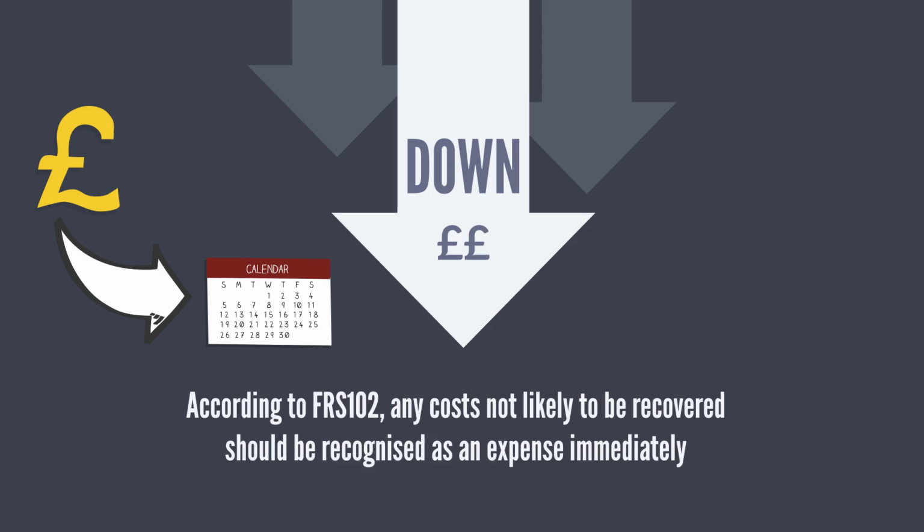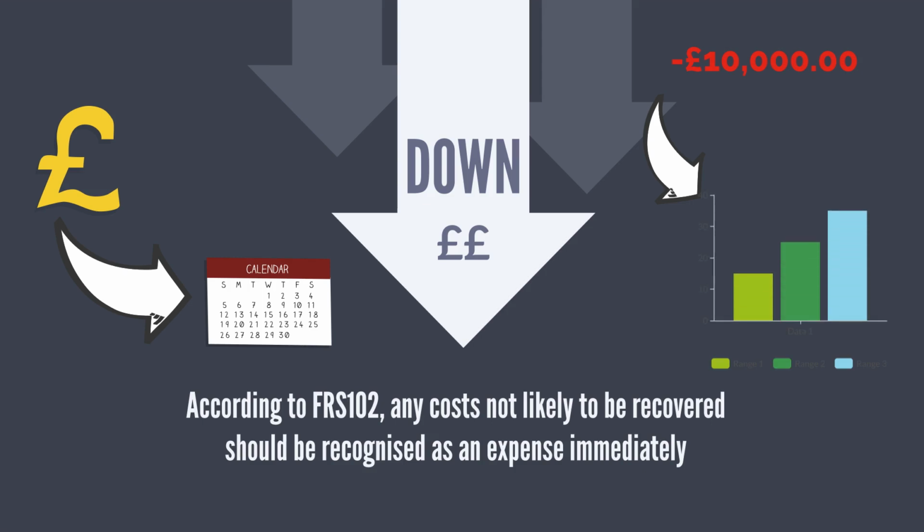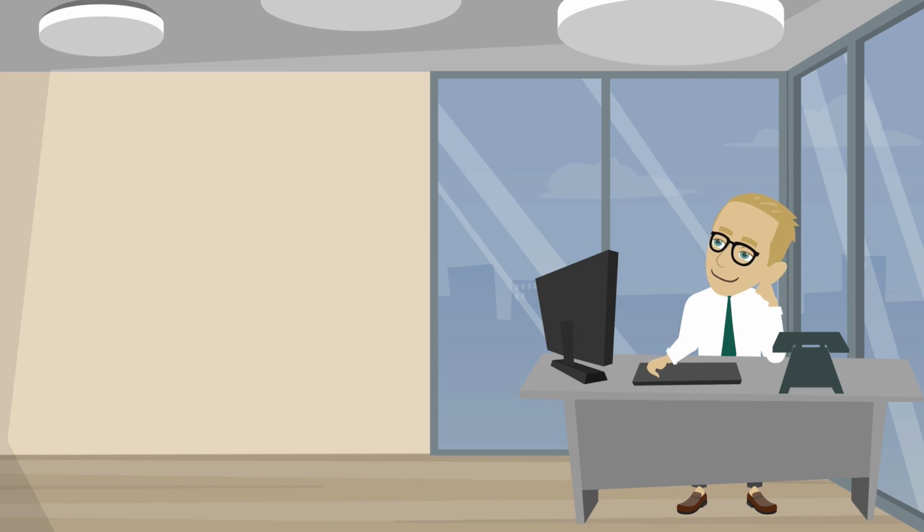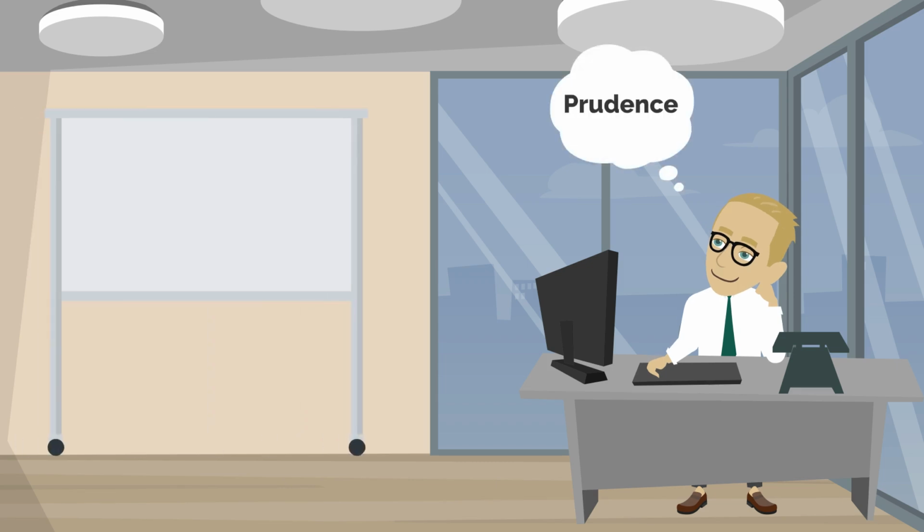Let's say you're working on a target cost contract, where you know the project will incur a pain share. The pain share applicable to that period would need to be reflected in the financial report, as it is an expected loss.